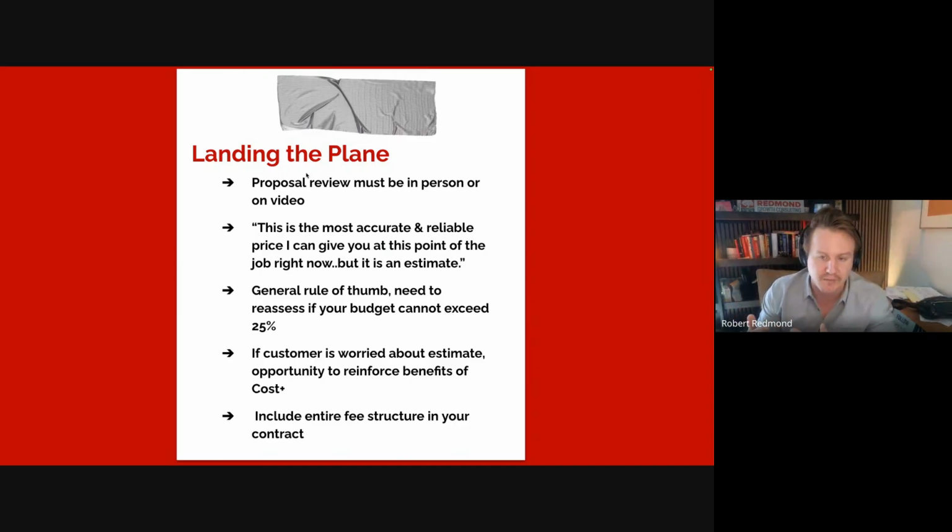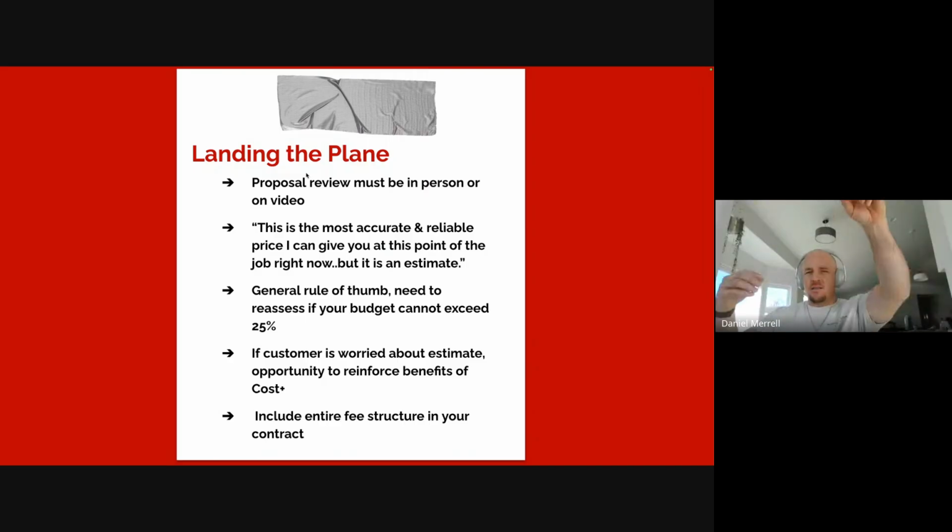That's why the cost plus really works. But if you're in an environment that's much more controlled, like for service businesses, right? Like I'm not telling people to run a service call on cost plus, right? Well, why not? Well, it's because the variables are a lot more controlled, right? If I'm going in to replace a 40-gallon water heater, there's not too many variables in that situation that are going to prevent me from being able to install, replace that water heater in a 4-hour time span, right?